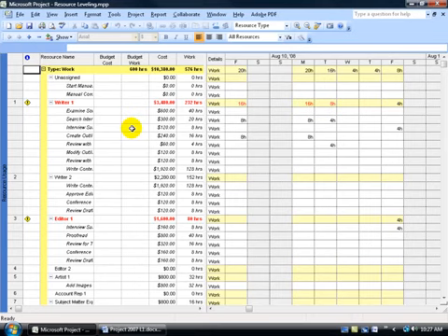As you recall in the previous training video, we learned to go to 3 different screens to find out which resources are overallocated. And every screen had its own different use for finding and getting details about the overallocation. My favorite was the resource usage sheet because it was the most detailed of the 3, wherein I can find the resource here in red that's overallocated, then over in the right pane get specific details about how many hours they're being overworked.